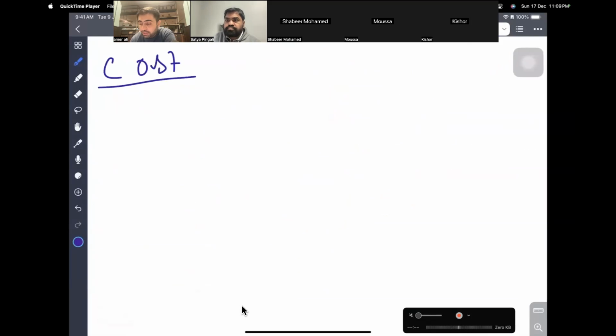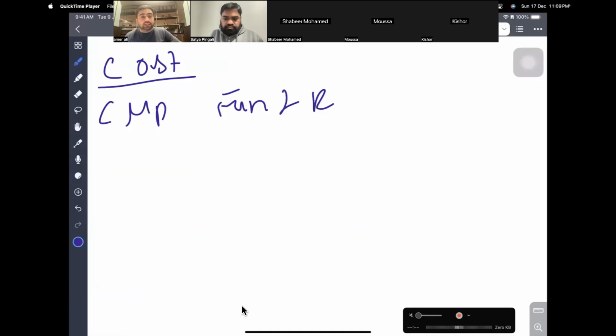We'll make a cost management plan that will have the details: how you are going to get financing, which currency you are going to use, what is your tolerance range, or threshold range. We will look into that. Then we'll look at our funding limit reconciliation. Funding limit reconciliation means we don't give the entire money in one go. We give it in parts, and then we look into that.